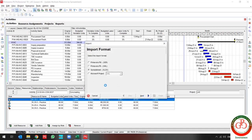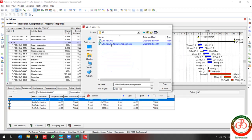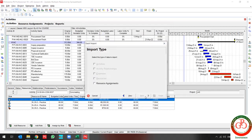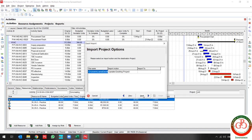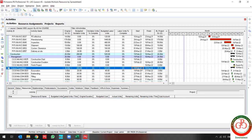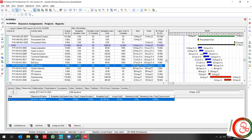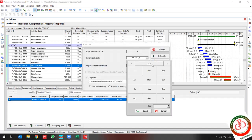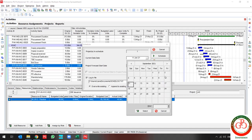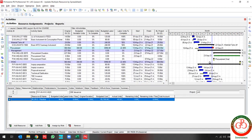Use the import, select the file, and use the resource assignment. Select the project and use the update. Now if I schedule my project to the 9th of September, my project is scheduled and updated.